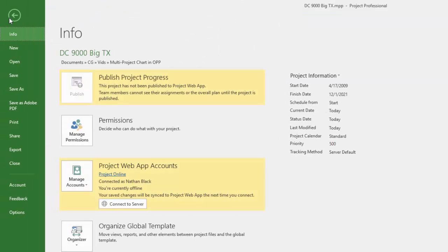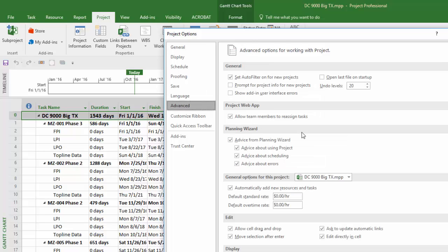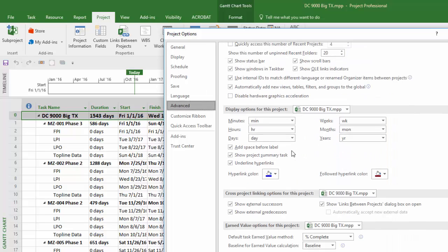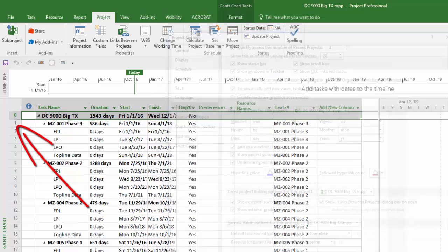To display this, you can open Project and click File, Options, Advanced, and then check the box to show project summary task. This value will now display as row zero.